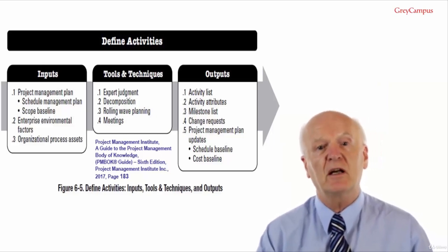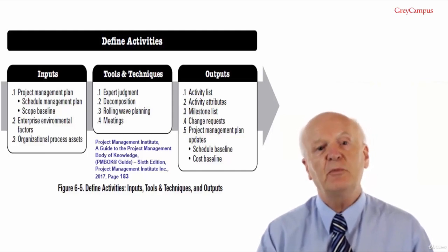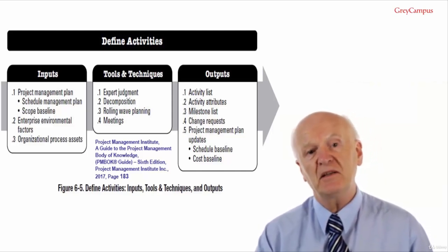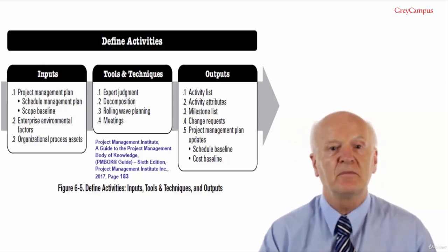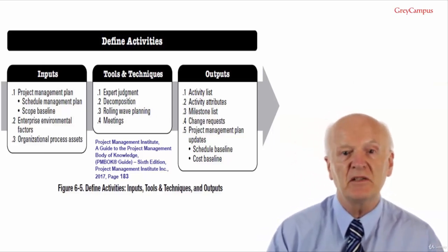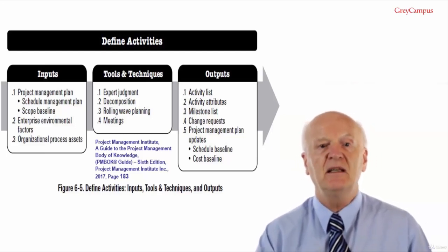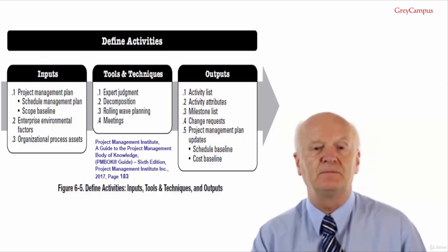D, no, because a kick-off meeting requires time and resources. You've probably guessed by now that the correct answer is D, no, because a kick-off party meeting requires time and resources. If you want to make it into a milestone, simply change the title to Kick-Off Party Held, and now it can be either one of two values, incomplete or complete.